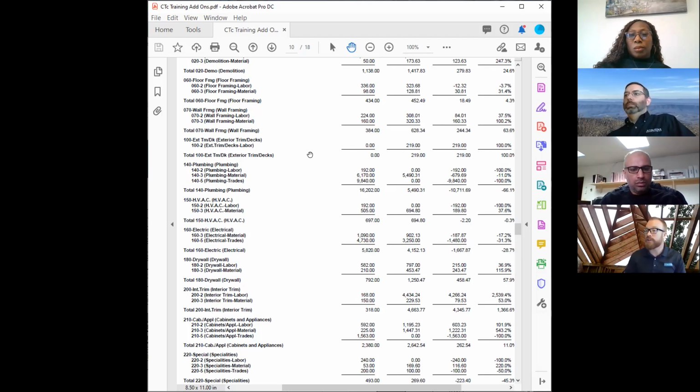Right now with the coronavirus going on, we have escalation of materials, but that could be a quick indication right now of a potential additional work order for a client if that product ends up being more expensive. So it's a miscode. Some miscodes we found got coded to the wrong project. So it's the right category, wrong project. So you just want to verify, like, hey, there might have been a plumbing fixture that got coded to this job that should go to another job.